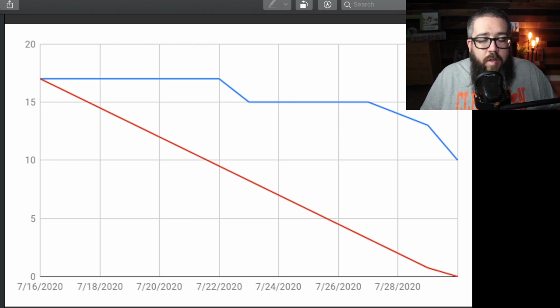Reduce your WIP. Stop starting all your stories when you exit sprint planning. Stop starting stories that aren't ready to get started. Start swarming on stories and getting them done. All right. The 10th out of 10 time, the reason your cycle time is too long is because you have a dependency problem. You started something that needed somebody else's help and wasn't ready. Which really means you're not a self-organizing team that has everything and everyone on it to get the job done. So go solve that problem.